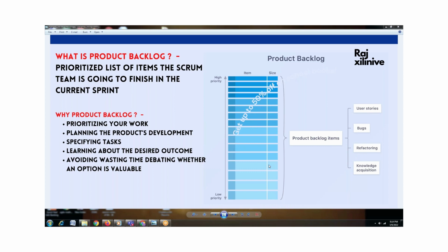Prioritization has a technique, which we call the MoSCoW technique. MoSCoW means must, should, could, would. Priorities are divided into 4 different parts. Must, which are very important. Should, which provide an additional advantage for the feature or functionality being developed. Could, which provide value-added services. Would, which doesn't mean future requirements, meaning they are optional, not required at this point in time, and may be used for optional purposes in future. This is how prioritization is usually made